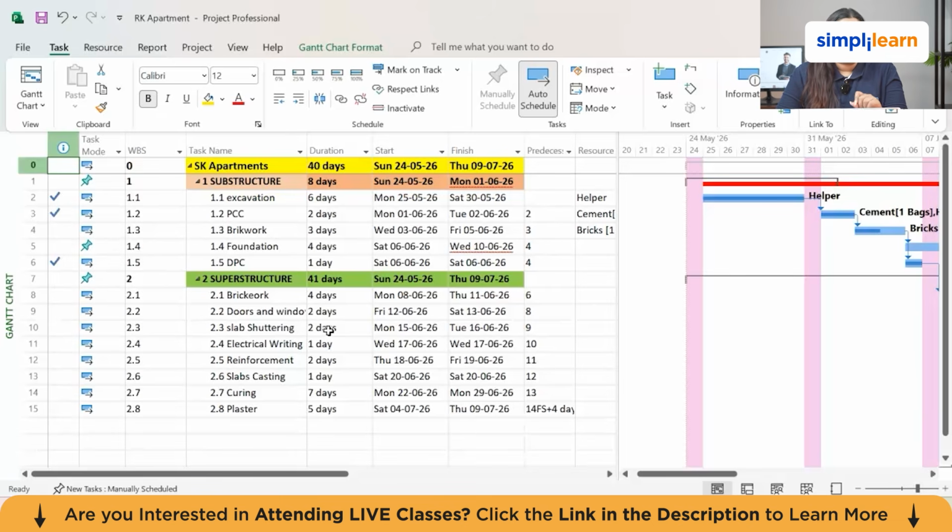If your schedule is up to date and your resources are assigned correctly, the cost overview report will give you a live financial dashboard. The critical task report gives you the focus list for your weekly management meeting. A cash flow report gives the QS a time-phased budget view. All from the same source file, in seconds.